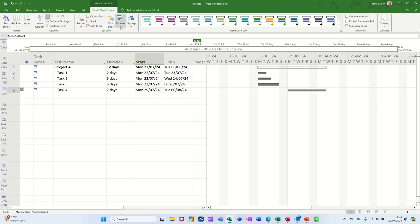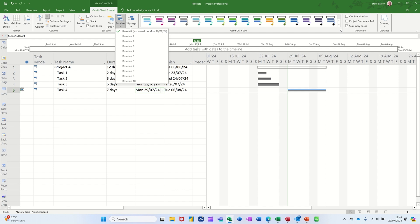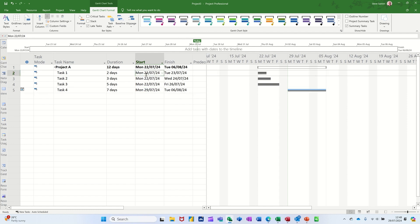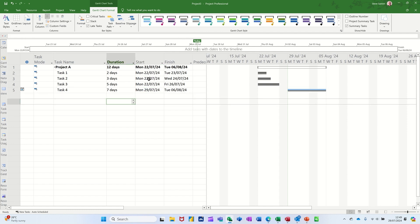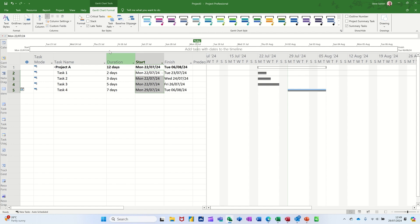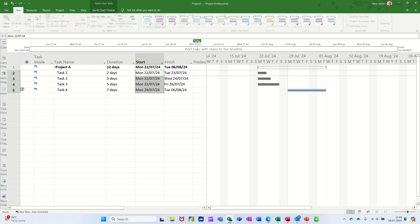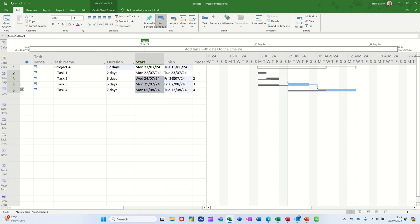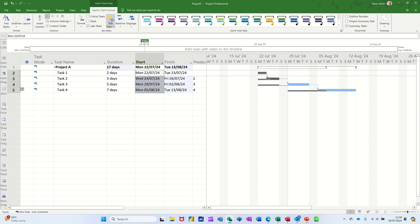Now if I go back to this and show that baseline, you can see if I show slippage of that baseline, there's no slippage because all of these are going on time. But if I then do a link, go back to tasks and link these, so they're all linked, you start seeing lines now because there's movement.